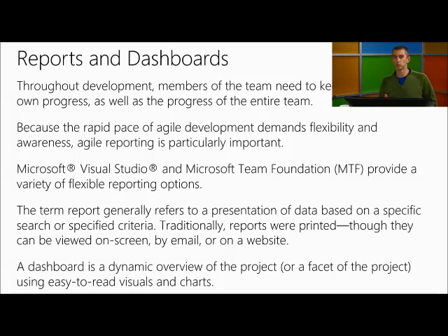Now, the distinction between a report and a dashboard is, a report is something you can print, something you're going to send out in an email. That's going to be your weekly status report or your all-up report that program management is sending. Kind of a point-in-time type of status. Whereas you've got the concept of a dashboard, where at any given moment you can look at that dashboard and see what your status is at that exact moment. So that gives you two really good tools for reporting.